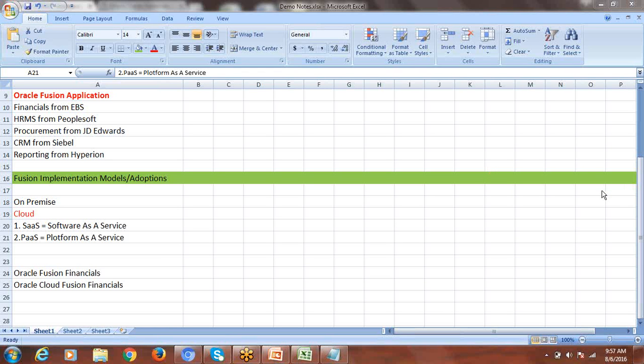First, you get the test environment, then you start doing the evaluations, present to the client, and do the testing and execution. Once everything is working fine and we get sign-off from the client, we ask Oracle to provide the fresh environment. Just as we get support from a dedicated DBA on our project, Oracle is there to help with all these activities.